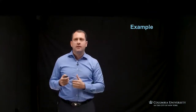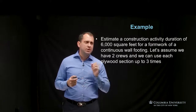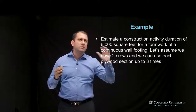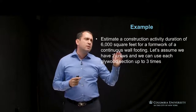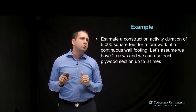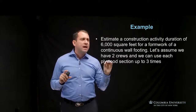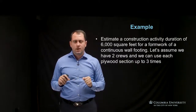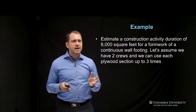Let's take an example. We want to estimate the construction activity duration for 6,000 square feet of formwork for a continuous wall footing. In the U.S. we use square feet, but you can use square meters if your projects use metric. Let's assume we have two crews working on this specific activity, and each plywood section can be used up to three times.